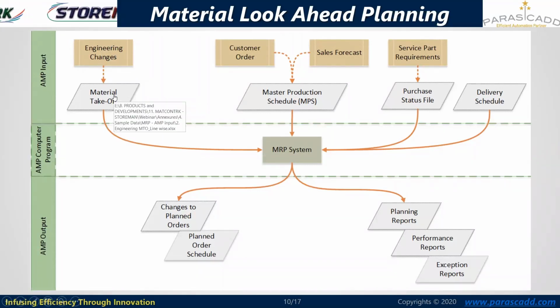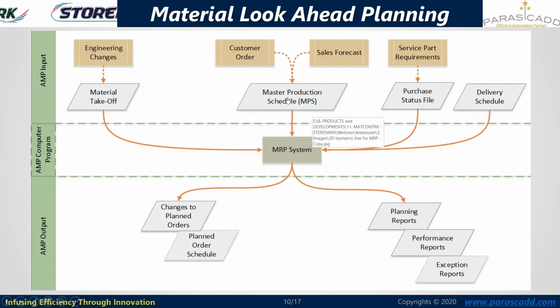Whenever these MTOs are taken into the planning stage, there are also chances that engineering will keep changing the quantities, as their review procedures, model review procedures, are also running in the background. So whatever changes are received will also be considered here. Whatever is the effective quantity to be considered for the analysis will be considered through this material takeoff input. The next input is the master production schedule, where the customer order or the client requirement is captured.